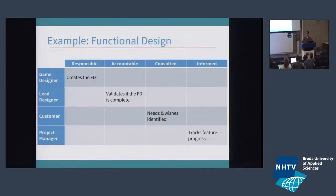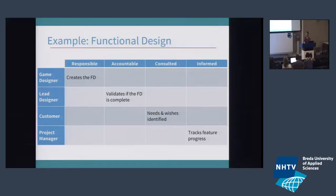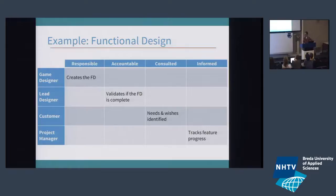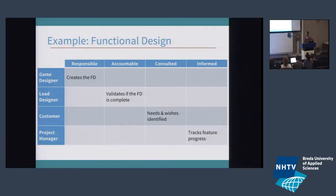Let's take the functional design of Feature X. It's the game designer who creates the functional design, together with a techie and an artist. But it might be the lead designer who actually signs off on it and validates that it's correct and complete — if something goes wrong, we go to the lead designer, not the game designer. The customer needs to be consulted because we need to understand their needs and wishes, which form the basis of the functional design. And the project manager just needs to track progress: is the functional design done? Is the first implementation done? Is the feature bug-free?